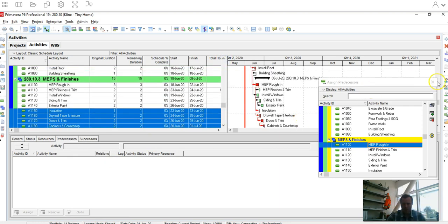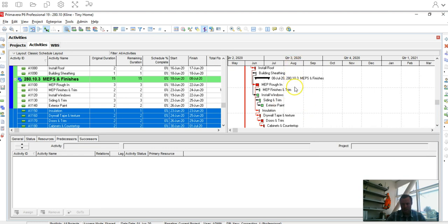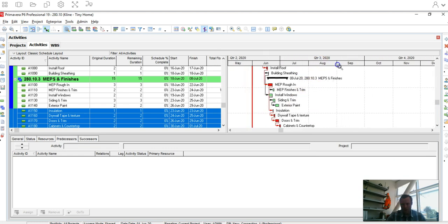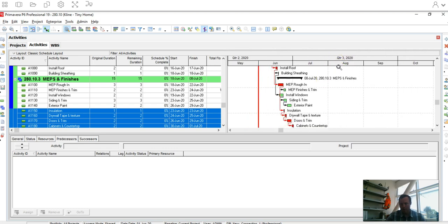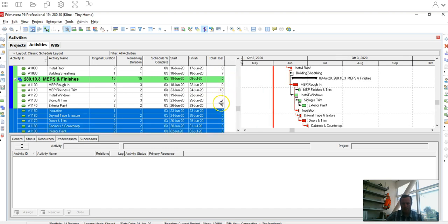So this is just a nice thing to see in P6. You can go ahead and use this little magnifying icon over here, drag that over, and your red line shows up as critical path. So critical path, just a little highlight, are items without float. So this automatically calculates your float.